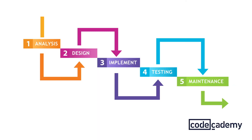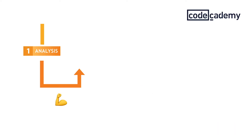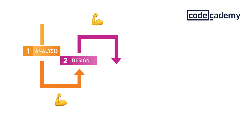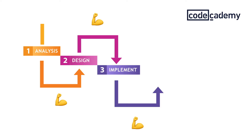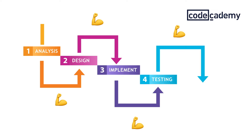The strength of waterfall is that it is strictly sequential and top-down. That means that there has to be thorough planning and documentation. This lends itself especially well to large projects that need more accurate estimations for approval even just to start. This means that each phase is stronger than the previous phase because you're building off of the knowledge and lessons learned from the last part. Also it's really hard to start your part of the project if you don't have all the resources that you need.